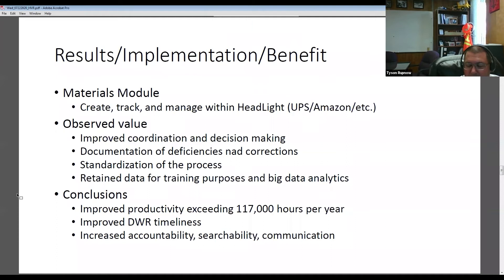In conclusions, we saw massive increases in productivity because our people were able to stay on the project an additional hour to an hour and a half versus traveling back to the office and inputting all of this in our computer systems. When we look at deploying this statewide, we're going to save about 117,000 person hours per year, which is equivalent to roughly 48 full-time positions. We improved daily working report or DWR timeliness. The time spent on DWRs—all of this is automatic at the end of the day. The inspector hits create DWR and it automatically pushes information into site manager. They don't have to sit and spend time to do it or delay that time.